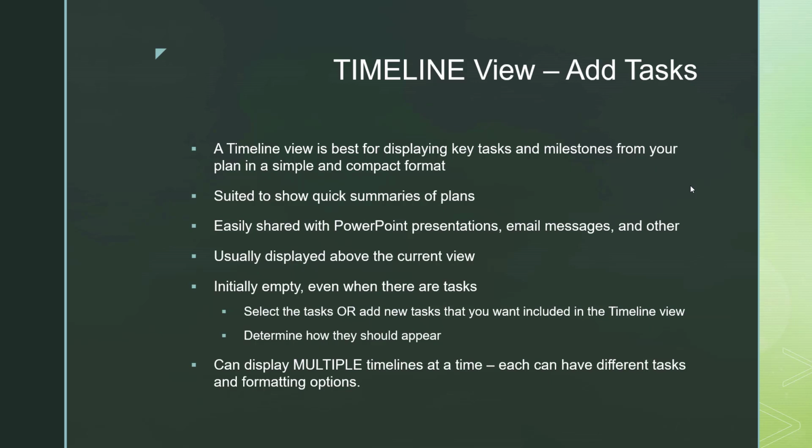And the other big thing about timelines is you can have multiple timelines on your one view. So you could have different timelines for different areas of the project, or maybe you have multiple companies that are working on a project. So you could have a timeline for each of those, and those would be stacked at the top. And it's a nice way to quickly view different pieces and parts.